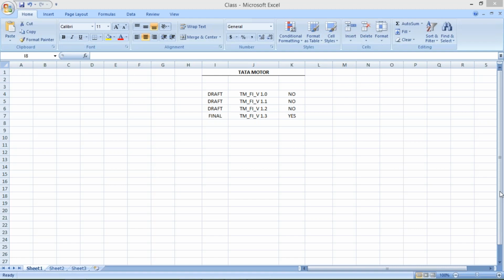So here what is happening, guys, in real time: even though the blueprint is prepared and we have taken the sign off and all, later on if the client comes with a new requirement, then they are going to convince the project manager. The project manager will say okay, you do one thing, increase the amount, because if the project has been committed within, let's suppose, 10 crore rupees, they will say increase the amount and increase the duration. So this is how it happens. If the client agrees, they'll increase some amount and they'll increase the duration also, isn't it?